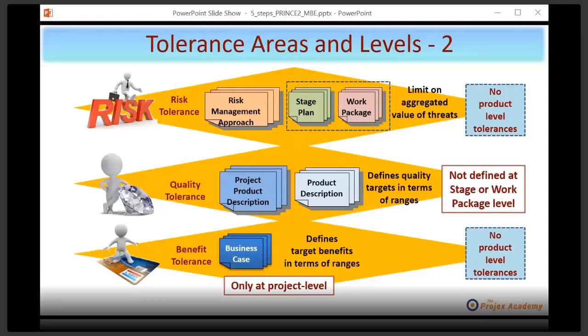Write that down if it's unfamiliar to you. It's a strange word, isn't it? I can't even find it in the dictionary, but I know what it means, and it's a good thing to have because it makes sure the business case is balanced and realistic. Now, here's a simple example of a disbenefit. The benefit is we're going to automate, let's say, a help desk so we can respond to customer inquiries much quicker. A disbenefit would be we'll have to retrain the existing staff because they won't be needed on that anymore, or unfortunately even let them go.